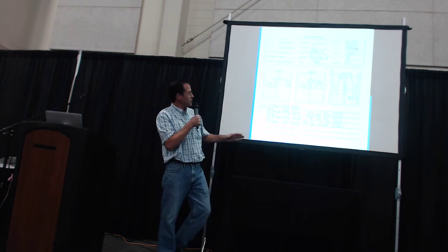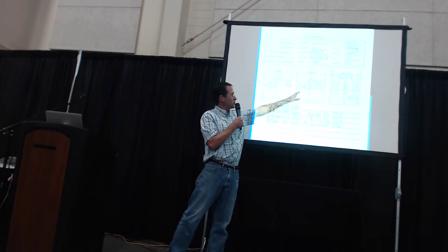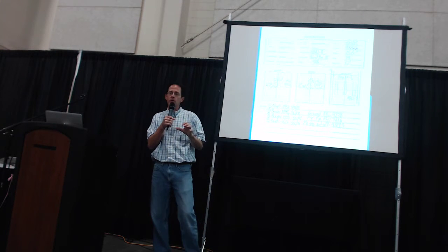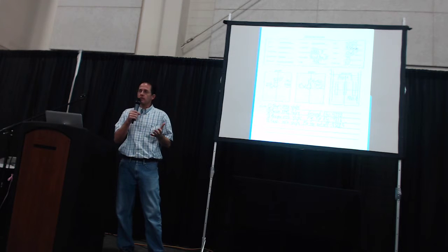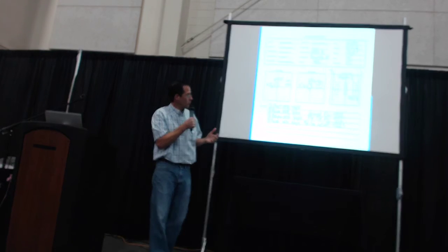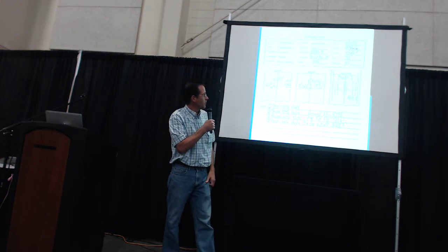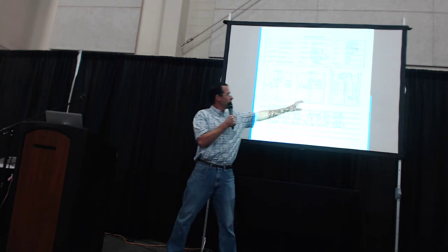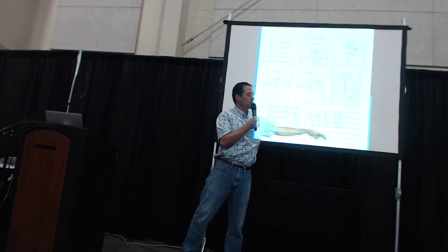And we show this example because this is showing that, okay, yes, it's 5 inches out in the north direction, 5 inches out in the west direction. 5 inches doesn't cause any penalties, but when you do Pythagorean's theorem, 5 squared plus 5 squared equals, in this case, 7.07 squared.